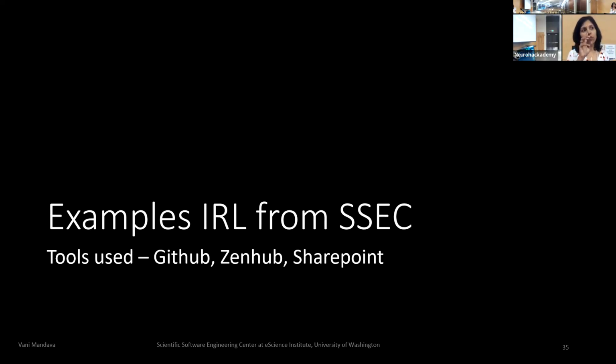Now, it also depends a little bit on where the accountability lies, right? If the accountability is just with you, if this is some hobby project you're doing, it probably doesn't matter. But if you had to ever revisit the project to determine what code you wrote to accomplish what task, it's really important to have that record of what issues contributed to what code in your code base. So if you look at some of the GitHub best practices, that is one of them. You cannot have pull requests not attached to issues.